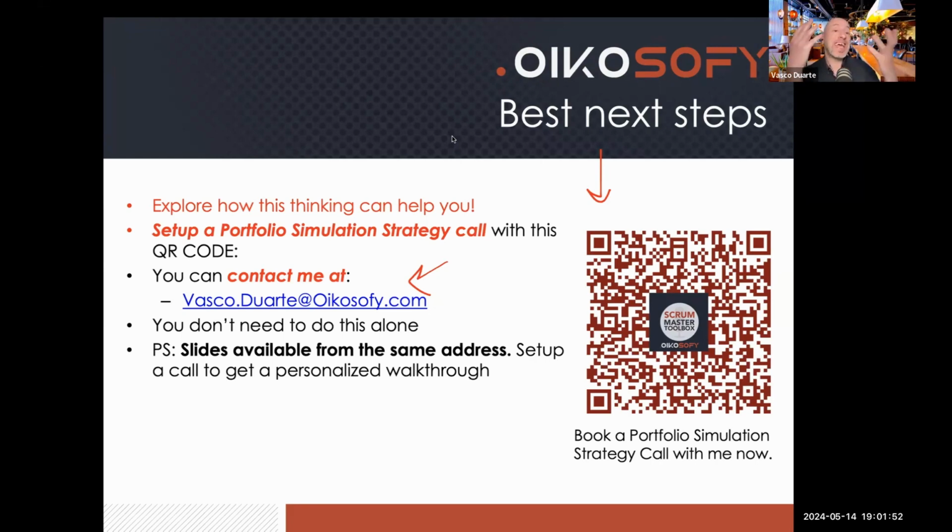An experiment is set up so that there's a belief stated about what we do and what the impact of that is. And one rule that we have in the company is that you should always get an experiment to production in 24 hours or less. Now, it may take more time to collect enough data to get a conclusion, but you should always take an experiment into production in 24 hours or less. And what that gives us is that cycle of adaptation based on real-time information that I'm talking about here in